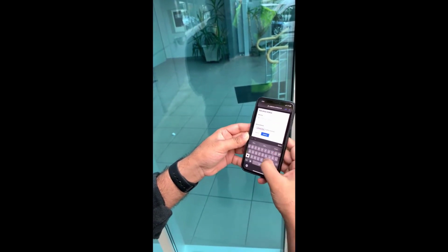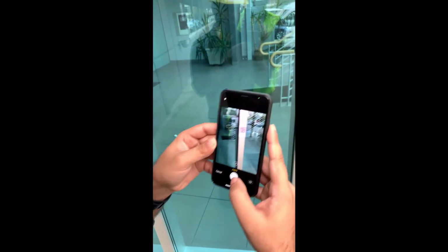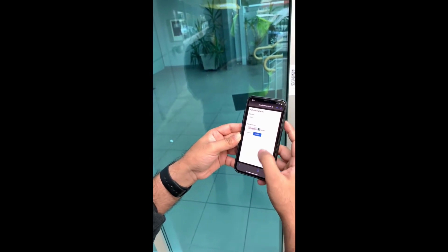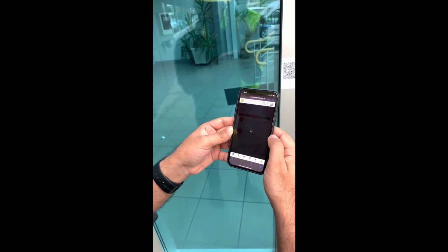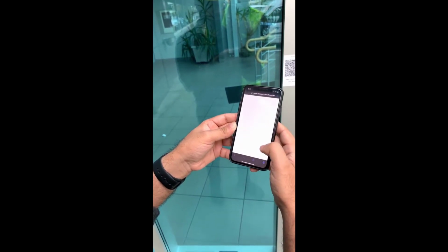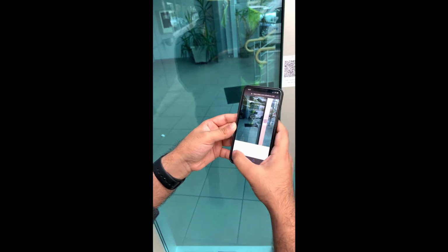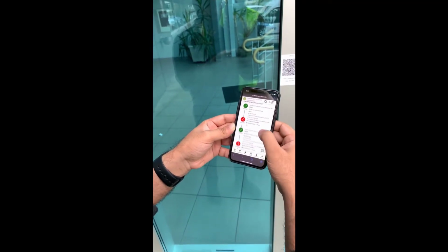From here, they can choose to add notes and also attach live images of the process or installation. At every update, cmExe accounts tied to user emails log who made the change, and timestamps track when the change was made. After submitting, the status of the project has now been updated on cmExe. They can also go to the History tab and see all of the previous work performed.